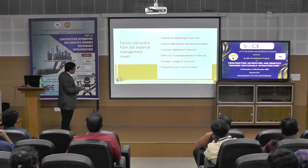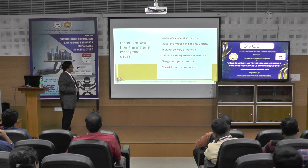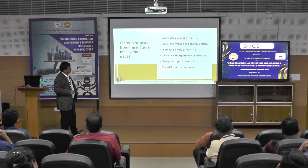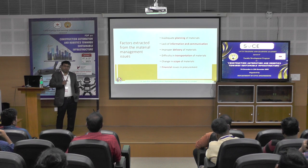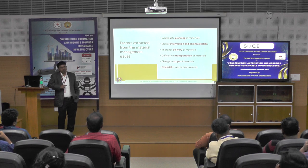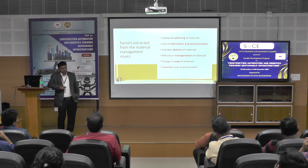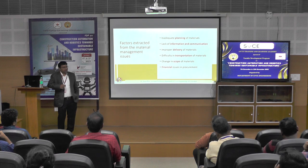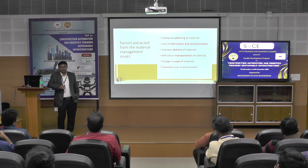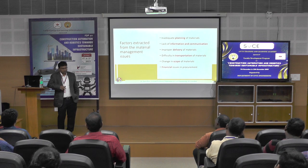Using exploratory factor analysis — one of two types, the other being confirmatory factor analysis — we extracted factors from those 33 variables. The extracted factors are: inadequate planning of materials, lack of information and communication, improper delivery of materials, difficulty in transportation of materials, change in scope, and financial issues in procurement.